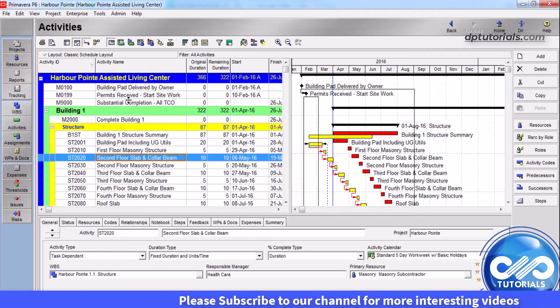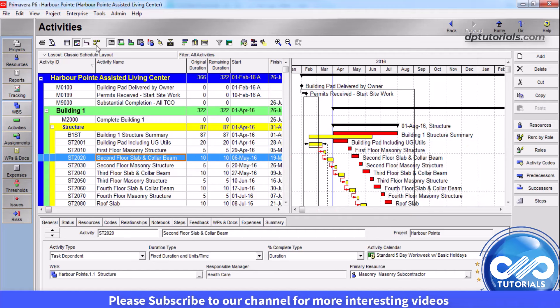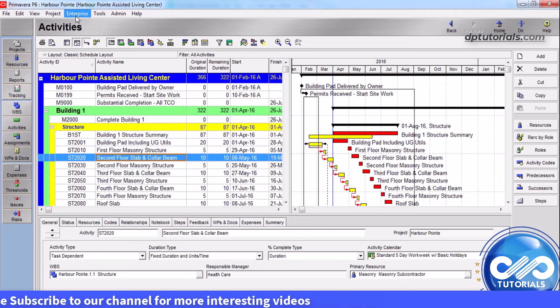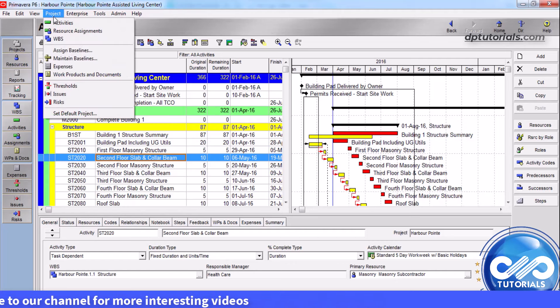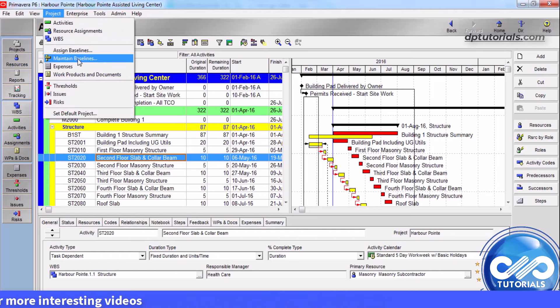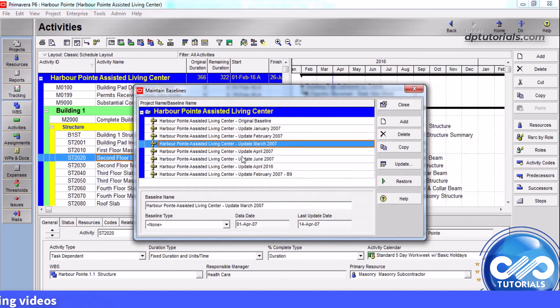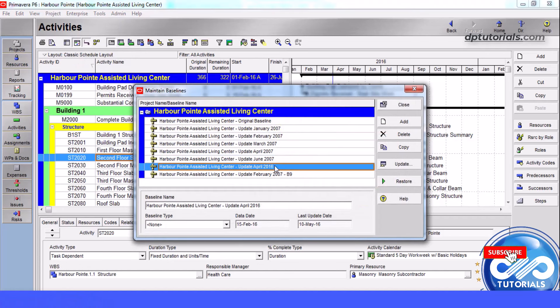To update a baseline, open the project. From the menu bar, choose Project, click on Maintain Baselines. Select the baseline that you want to update and click on Update.